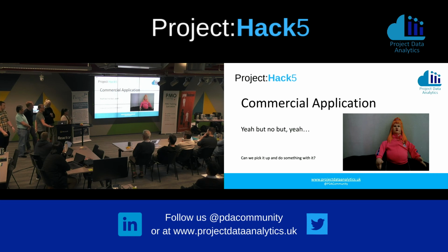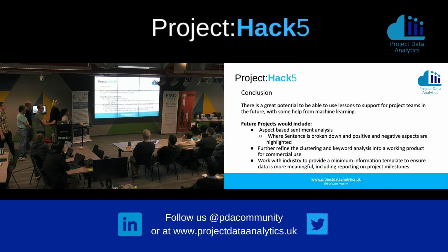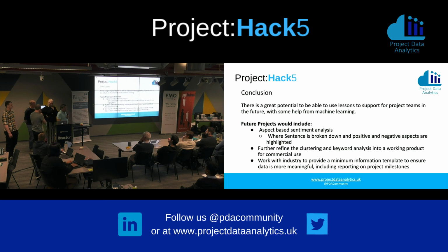The only thing that we really found was it's extremely difficult to work from, obviously, unstructured data, and we'd need a template which requires minimum information. However, the biggest lesson learned going forward, if we start a new project, would be to set a template first. We don't expect to have every single detail in there, but there has to be minimal requirements. So in conclusion, we see potential for this kind of work.